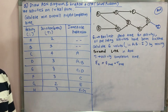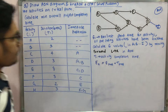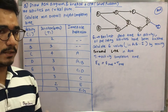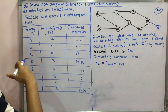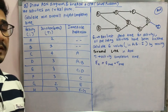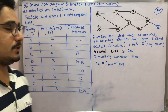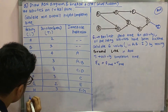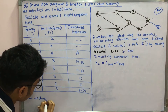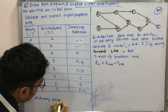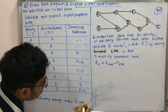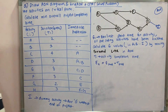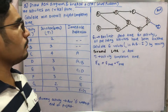Now you need to start drawing the AON diagram. Whenever you start a project you have initialization, planning, requirement gathering, and so on as consecutive activities. There is a deadline given by the client for project submission, which is not in this chart. So you consider it as a dummy activity.